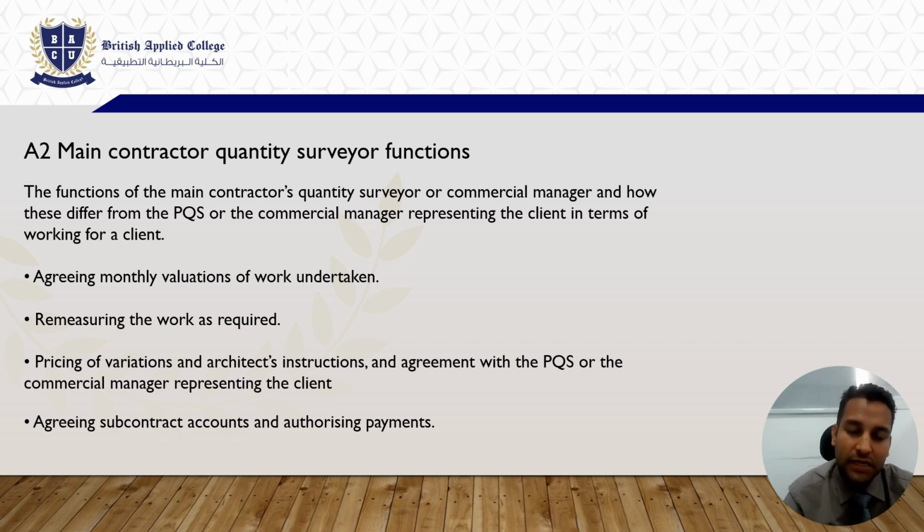In those few years there would be a fluctuation of pricing, because at the initial stage the quantity surveyor for the client makes the measurement, the bill of quantities and all the pricing according to the present conditions. But as time goes on, this pricing has to increase depending upon the variation in the market. So he needs to take care of the pricing variation.